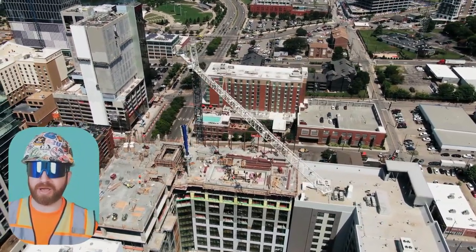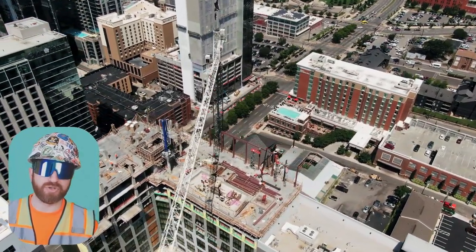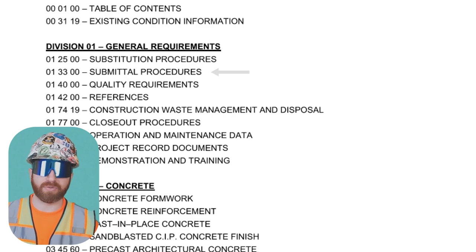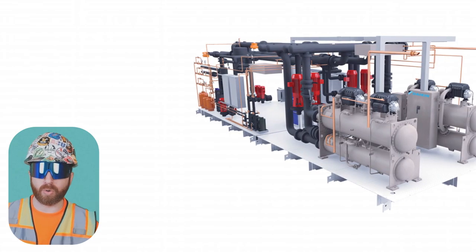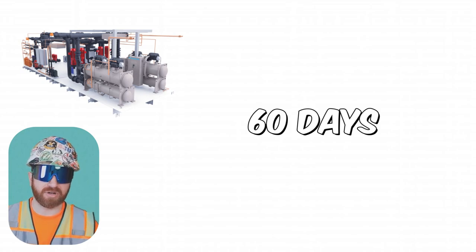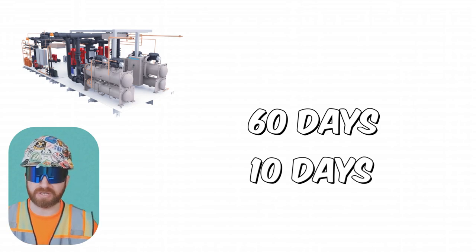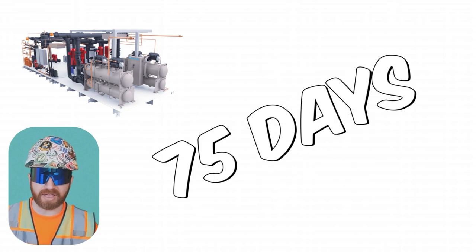Project management is really just managing risk, so where can risk be introduced into the submittal process? It's usually schedule related. The submittal specification section should outline the terms for reviewing submittals and returning them. For example, if you're ordering a large piece of equipment that takes 60 days to arrive from the manufacturer, and the spec section allows a 10-day review period, and it takes five days on the front end to prepare the submittal — that's 75 days, or two and a half months, before the material arrives.